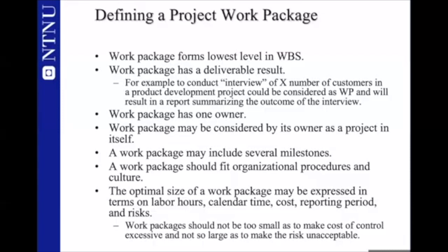Why? Because you want to be able to control it. You want to be able to control the risks. You know very well, the longer duration you have, the more risks there are, the more uncertainty. So the shorter duration you have, the more ability you will have to complete this work package.